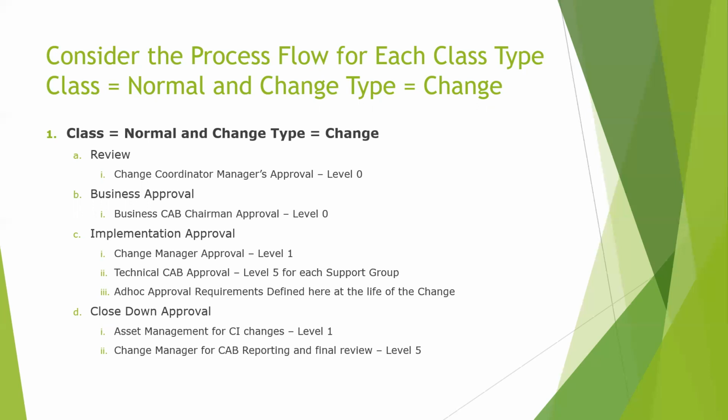The bottom one, I put in asset management because when I worked for this customer on this one, we got paid for every change that we closed. The problem was we had to make sure the CMDB was updated. So if I waited with the task to have the CMDB evaluated, we had to wait till their discovery came in. That could take 2 or 3 weeks. Guess what? That hit our pocketbook.